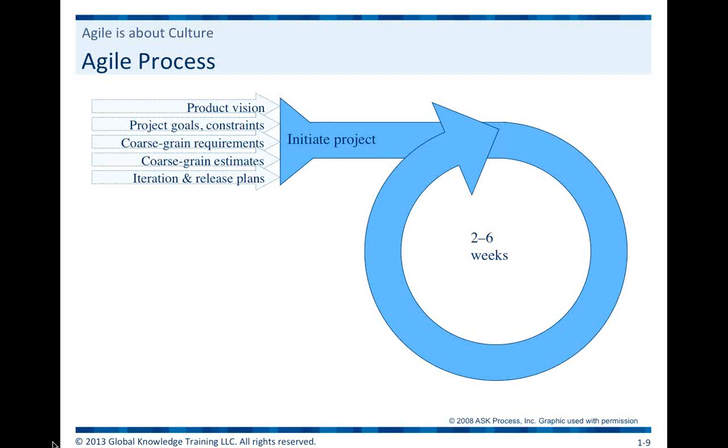Each day, we like to have what we call stand-up meetings, and there's 3 questions that we like to ask. What value did you bring to the project yesterday? What value do you plan to bring to the project today? And what impediments or roadblocks are in your way that are preventing you from achieving your success? And if you're the project manager or the scrum master or whomever you happen to be, that's where you spend your entire day removing those roadblocks.